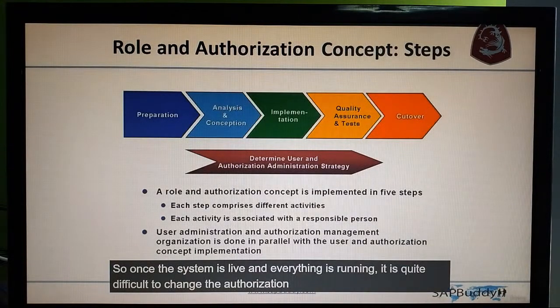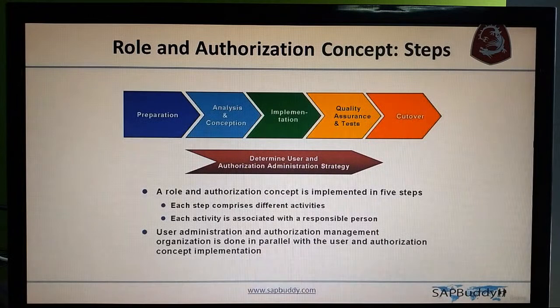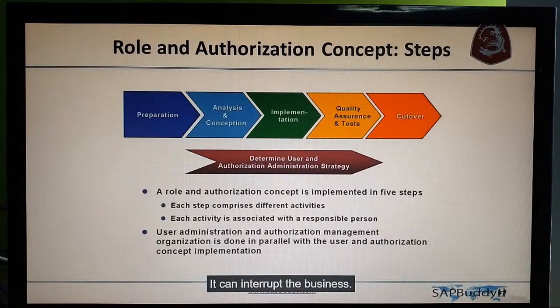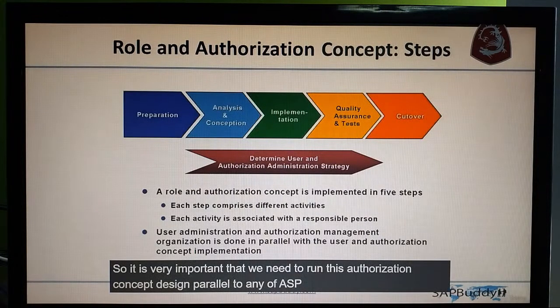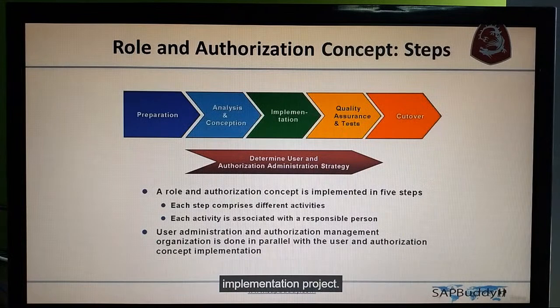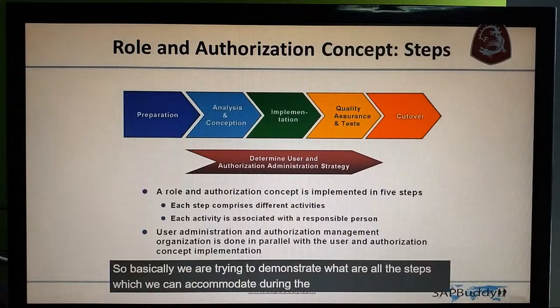Once the system is live and everything is running, it is quite difficult to change the authorization settings. It can interrupt the business. So it is very important that we run this authorization concept design parallel to any SAP implementation project.